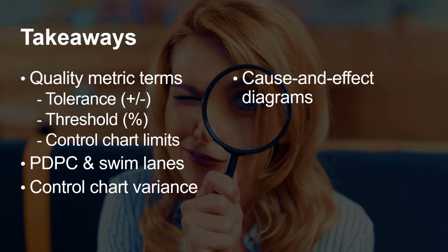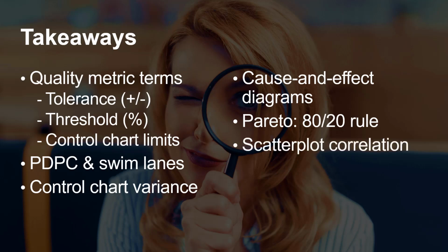The Pareto principle or 80-20 rule says that roughly 80% of the effects come from 20% of the causes. Once we tally up a check sheet of the main causes behind our anomalies, we use a Pareto diagram sorted by the highest incident first to prioritize our countermeasures. With scatter plots, a positive correlation trending up or a negative one trending down can help us find relevant factors behind our quality issues. No correlation is a signal to look elsewhere.